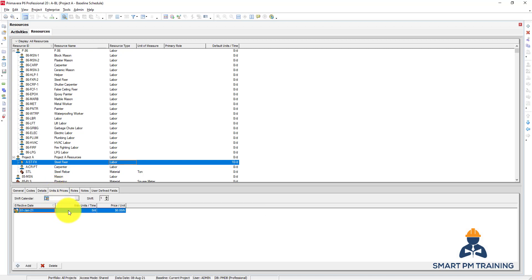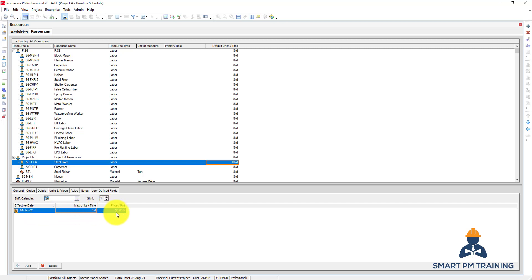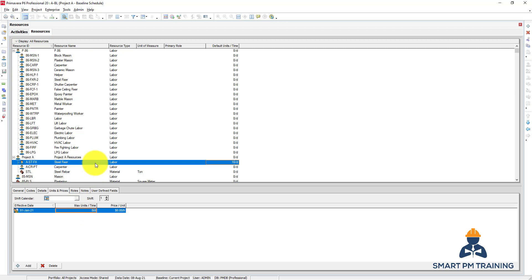Units and the Prices. So this is the maximum units per time. We have here the effective date and maximum units per time and the price per unit. So maximum units per time is 8 per day. So how many hours maximum this resource can be deployed, regardless how many labors are working.